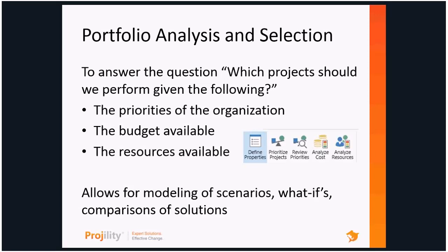What this does, think of it really as a sandbox. And it can be a gate in your process where you can say, okay, projects don't get approved until they go through formal analysis and selection by the PMO. And once that happens, your project is off, it's been budgeted, you can do it. Or you can have other projects that bypass this process, understanding people may have discretionary budgets and then non-discretionary ones which have to follow this process or procedure.